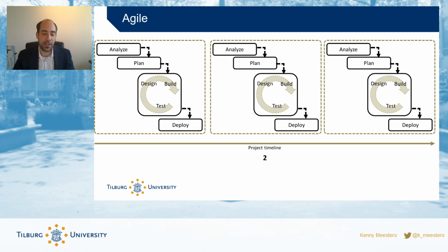Agile development, the upside is you don't need to know the requirements. You can uncover and you can adapt to the situation as the project goes on. The downside, as you may guess, is that when you do agile development, you don't know what the end goal is, and the risk is that the project will continue and start creeping. With every cycle, there might be something new you discover. Even more, as the project lasts longer, circumstances will change, and so will the requirements, and so you need to revise the prototype completely.